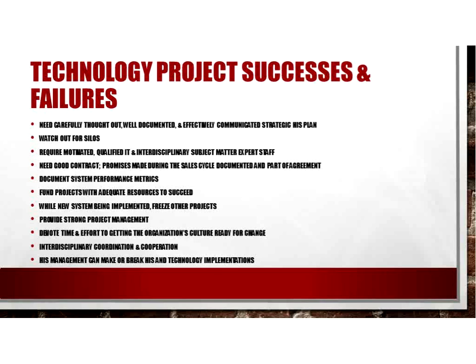Include all applications and modules that the vendor offers in one site license, even if as an organization you don't have any plans right now to implement those modules. You have to remember that your leverage will never be greater than it is before you sign that agreement. So that's where you need to implement all those things. Promises made during your sales cycle must be written down and defined in exact specificity, attached and committed to in writing as part of your agreement.